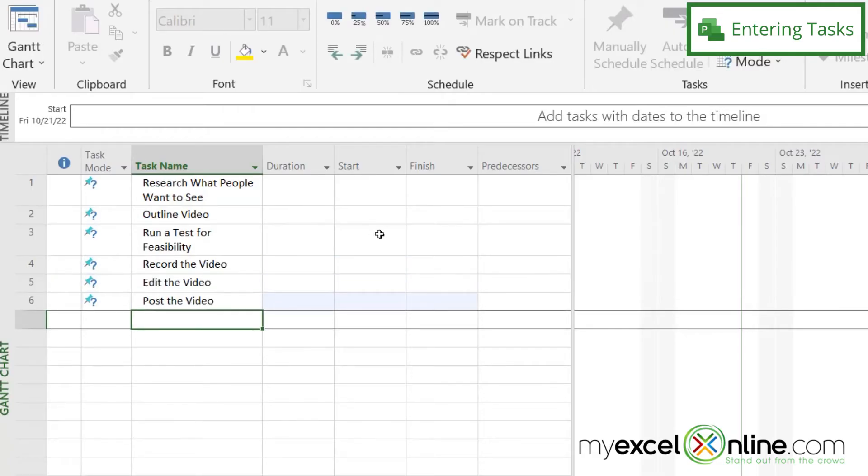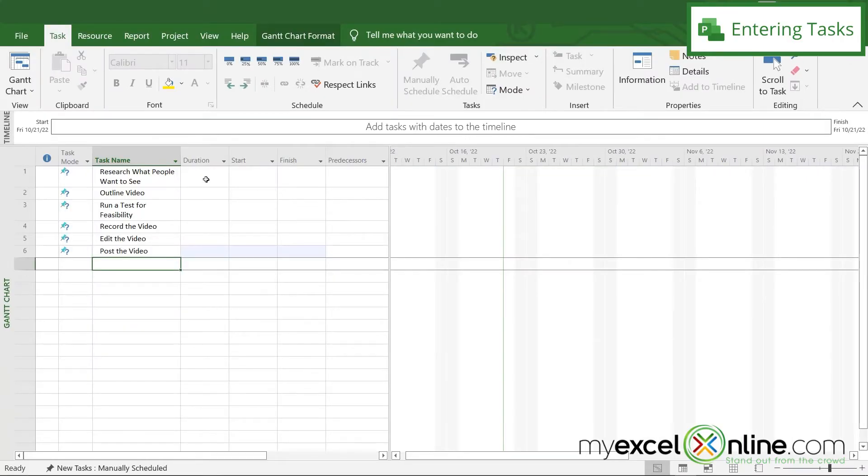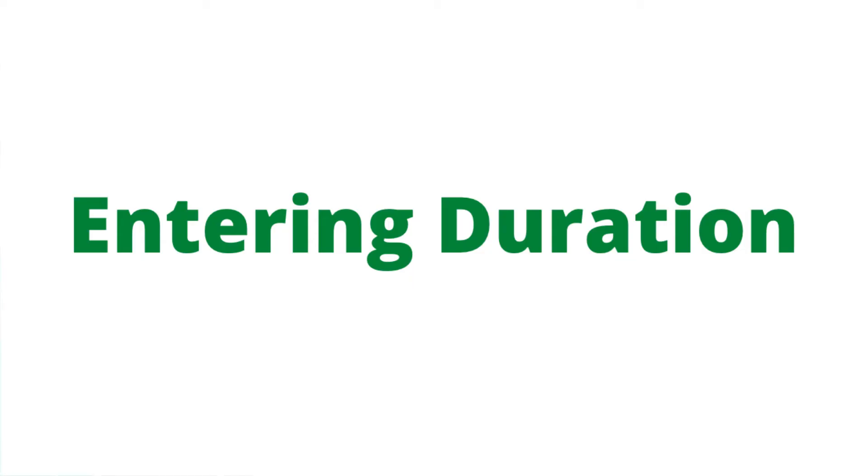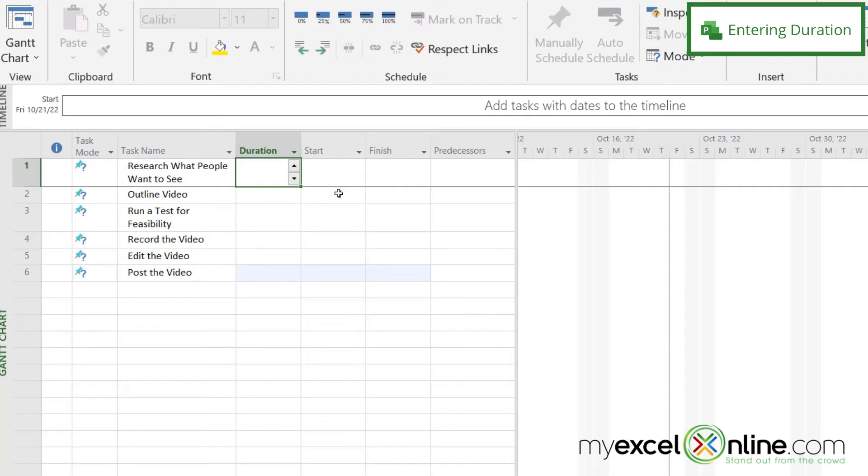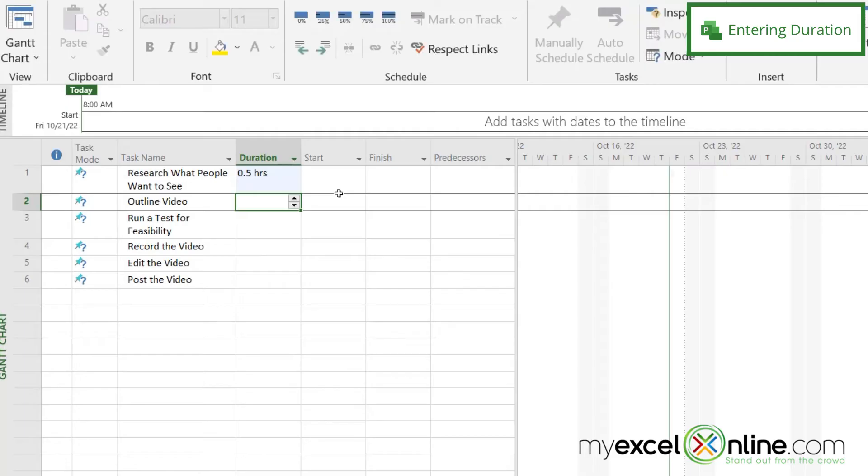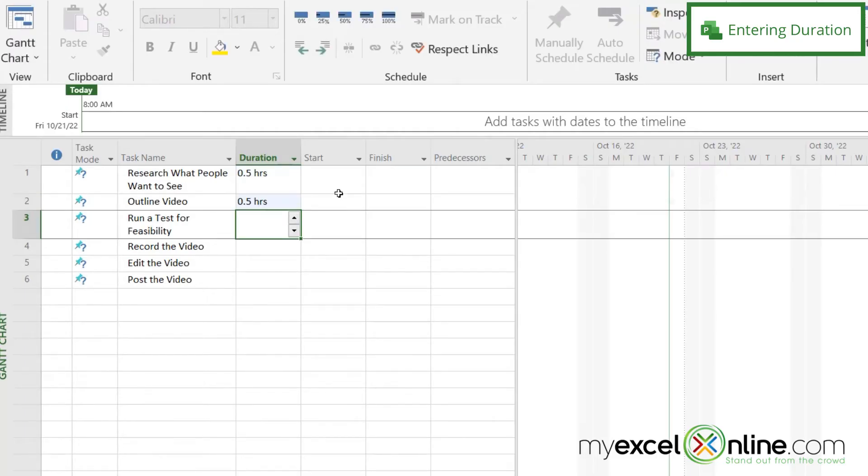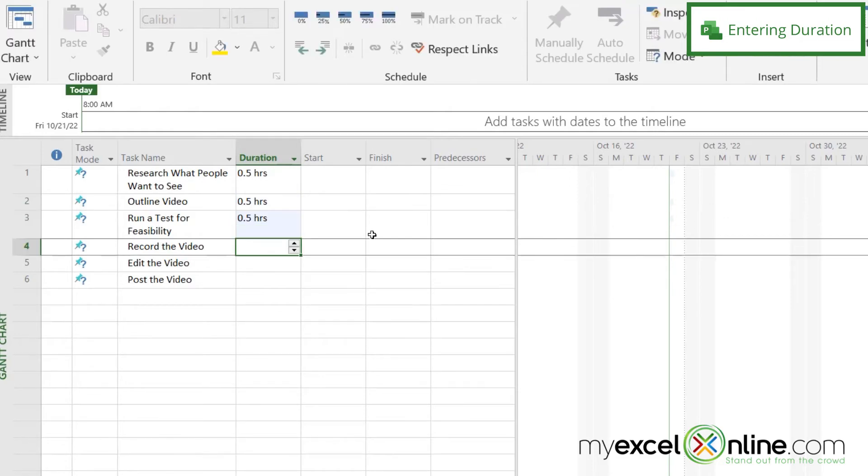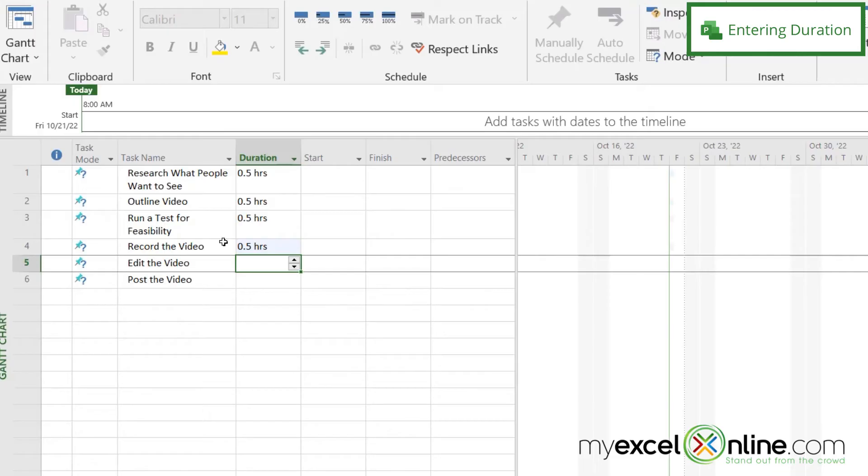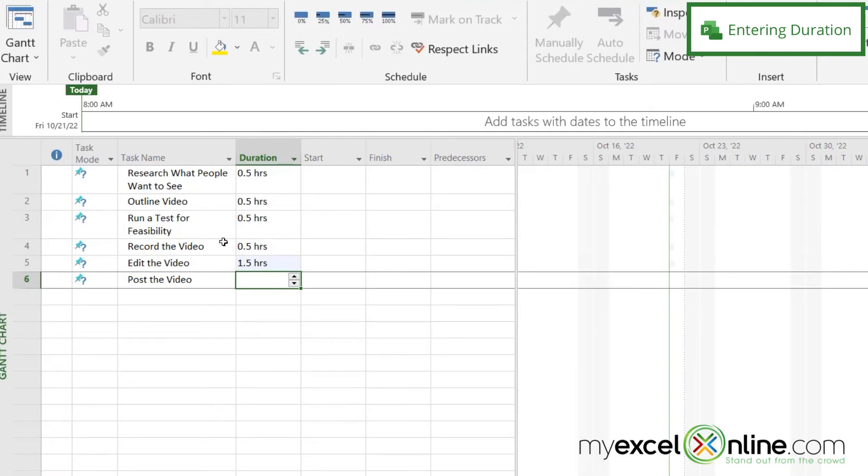So these are my basic steps that I would do to create a video. Researching what people would want to see, let's say that takes half an hour, so I'm just going to say 0.5H. And how long is it going to take me to outline my video? Let's say that's going to take another half an hour. Running the test for feasibility takes half an hour. Recording the video will take half an hour. Editing the video is going to take an hour and a half. And posting the video, let's say that takes another half an hour.